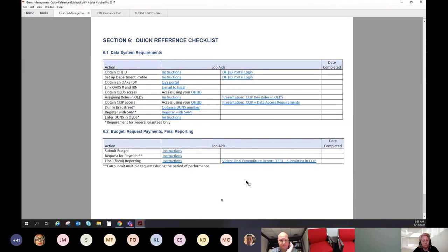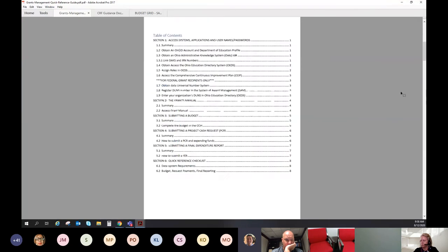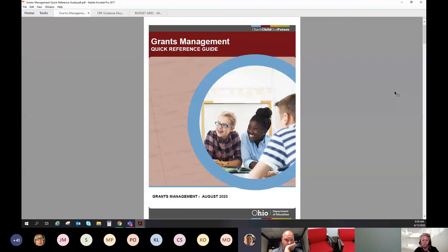It's cumulative in the cash request, because the system is going to compare what it's already paid you, like the amount received, and say, okay, you put in $2,000 in expenses. We know that we've sent you $1,000, so we're going to go ahead and pay you out $1,000. So just make sure you know that it's cumulative. That's it. Now that sounds important. So every time you go back and add another request, the actual number is cumulative. It's what you spent all the way up to this point. Right? Yes.